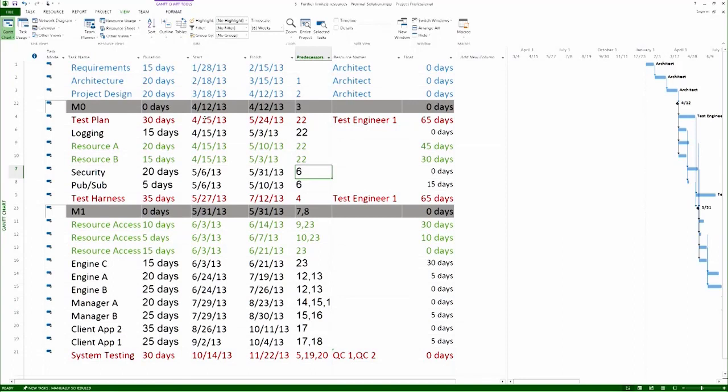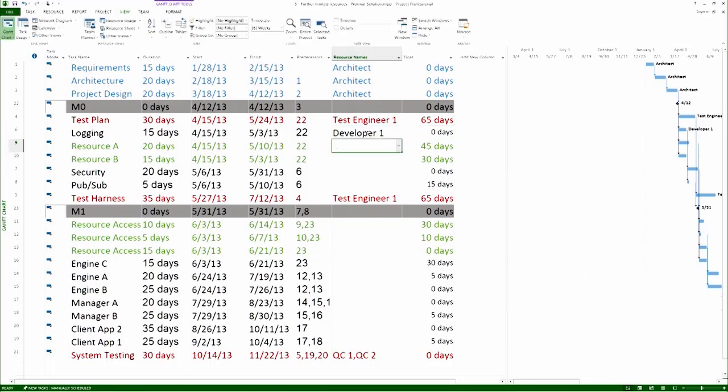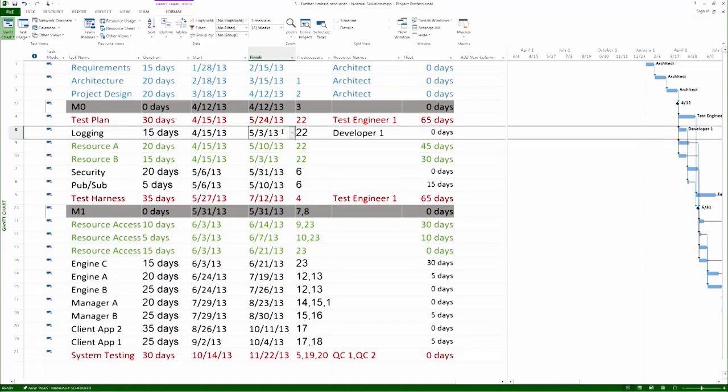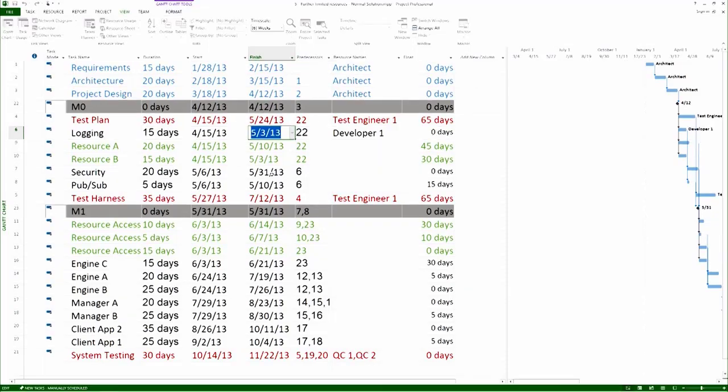So, we see that on 4.15, we have a bunch of activities. And this activity has zero days of float. And so, we're going to assign developer one here first. One way of doing assignment is taking a particular resource and following the timeline of that resource through the project. And so, developer one is working from 4.15 to 5.3. So, developer one pops back on the network on 5.3. 5.3 is a Friday. The following Monday is 5.6. So, we can actually look at around 5.6 for an activity for that developer to do.